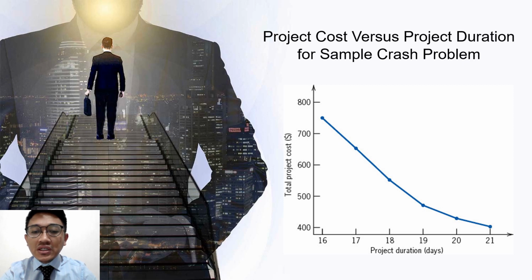As project duration decreases, crashing costs tend to rise due to increased resource utilization and potential overtime expenses. The graphical representation helps managers visualize the trade-offs between time and costs, aiding in decision-making to achieve optimal project completion, balancing budget constraints with the need for timely delivery.